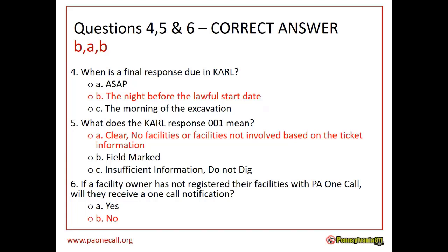Just to be sure for anybody that didn't get it right, the final response is due the night before the lawful start date. That's 11:59:59, but it'd be better if you could get it in a little earlier than that. The KARL response 001, just as a note, that changed recently. It used to just be clear, no facilities, but we added a little bit more language to it that says, or facilities not involved based on the ticket information. So that might be new information for you.